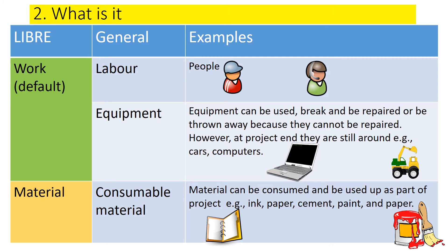The second type of resource in Project Libre is material, understood as consumable material. This type of consumable material can be used up during the project and as part of the project — in fact, they must be used up — like ink, paper, cement, paint. Those are things that are consumed, that are used.